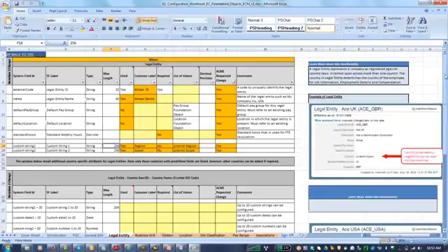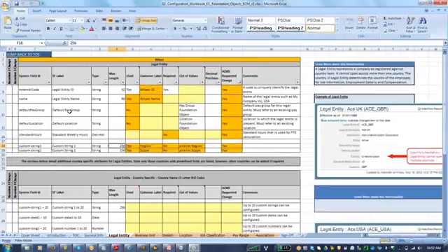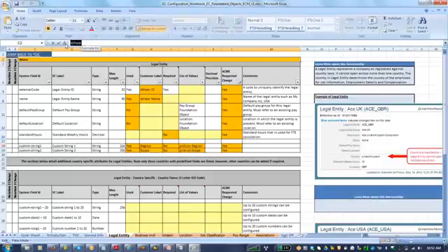So this is a living document, and we need to help them constantly keep updating this with the changes and whatever is relevant for them, and then take the sign off and do the config accordingly. Once this is prepared, our job is done. The major work for us will be to get the configuration workbook done, and also the field mapping for the user data file. That's another big job in Employee Central. You have to match the legacy data with the Employee Central UDF file. Once you do the matching, the data loading will be very easy.